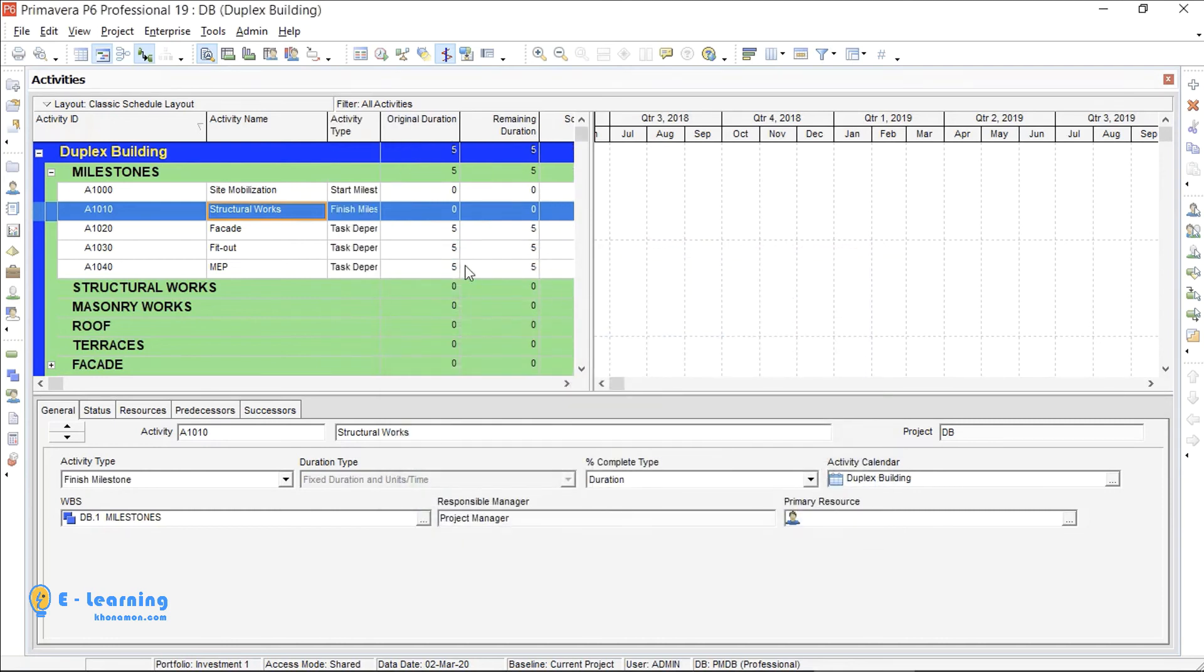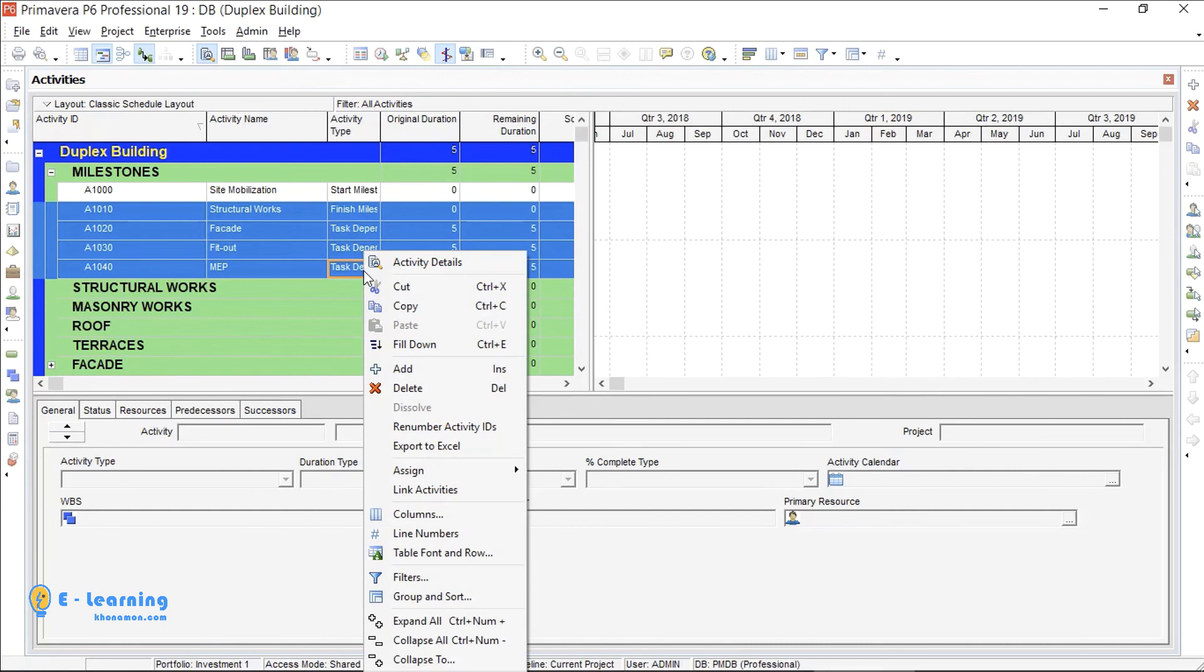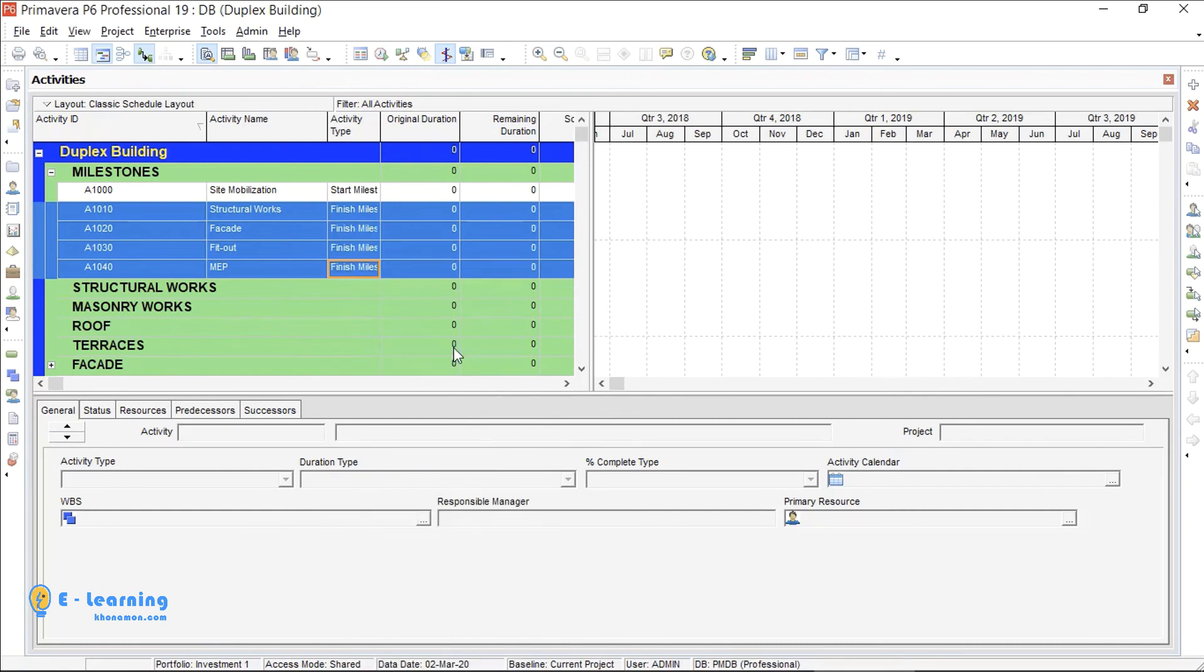Now I select my activity, press Shift from keyboard and select the last activity. I right click, then Fill Down. All are changed to finish milestone.